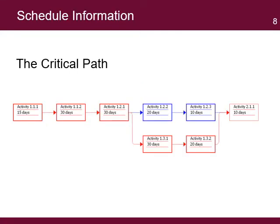Another benefit of a network diagram is the identification of the project critical path, which is the longest path in the network diagram. In this diagram, the project's critical path is the path with the longest duration. In this example, the critical path is the series of activities marked in red with a total of 135 days.